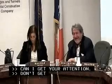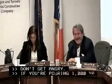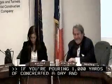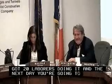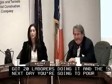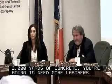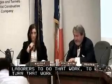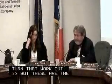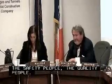If you're pouring 1,000 yards of concrete a day, and you've got 20 laborers doing that, and the next day you're going to pour 2,000 yards of concrete, you're going to need more laborers. So to try to explain it in a simple manner, you're expecting to do more work, but you're going to need more laborers to turn that work out. These are the inspectors and the administrators, the safety people, the quality people. There are all kinds of people that are coming in the future because you're going to gear up.